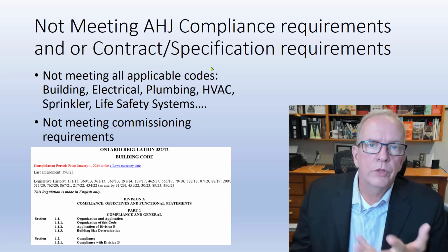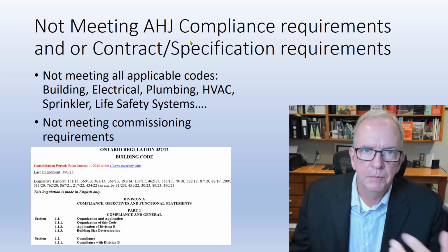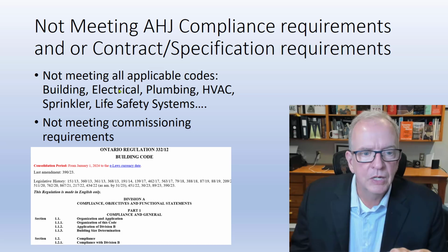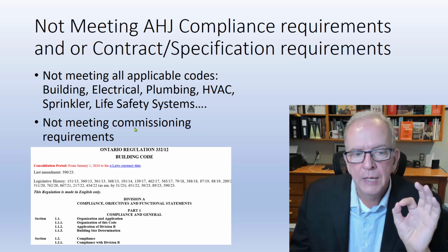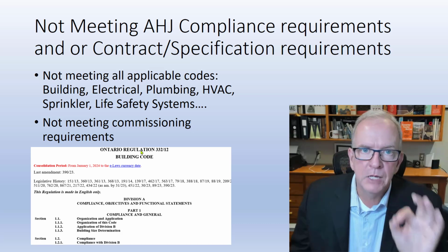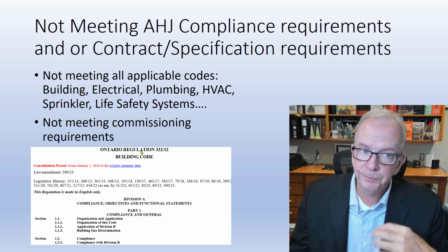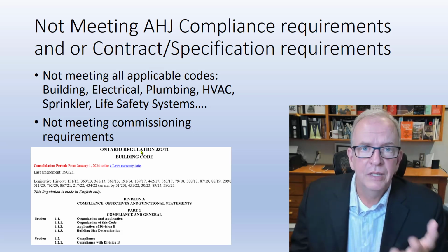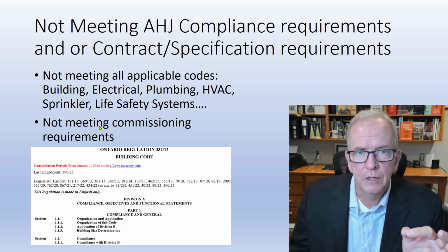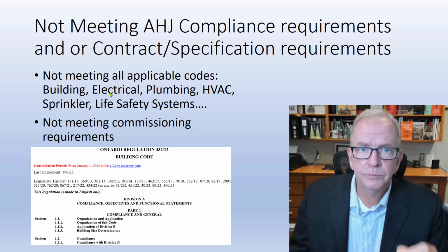And of course, there are all the compliance requirements of the authorities having jurisdiction, inspections, but we're talking about passing inspections here. It could also be the client's commissioning agent, who is basically making sure that the building is functioning the way it was designed. If it doesn't, then we have to redo it. So if there's something you're not sure of, it's best to bring in the inspector ahead of time to make sure it's going to comply.